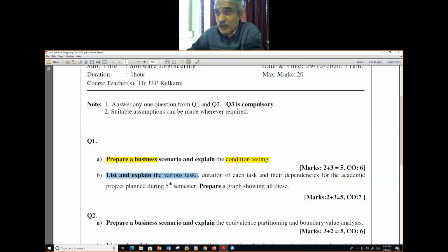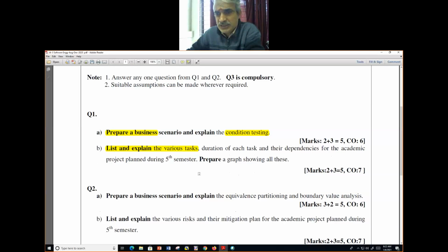It could be software requirement collection, freezing of that, procurement of software, a training program, module 1 delivery, installation, writing test scripts, completing testing of module 1. It is at the higher level, with their dependencies, not the lower levels. And it is with reference to your project that you need to write, not in general. This is what we have seen.